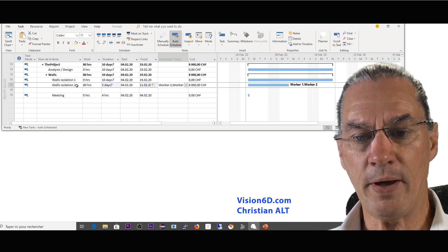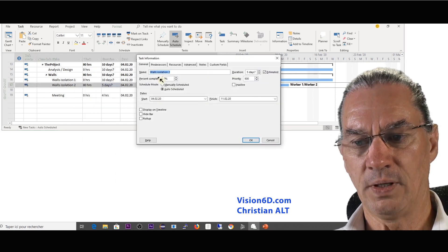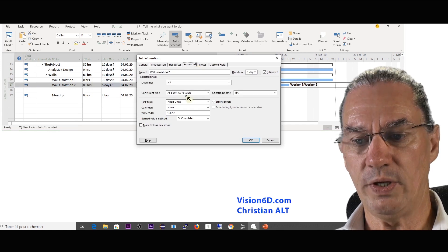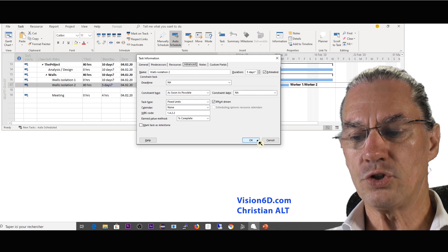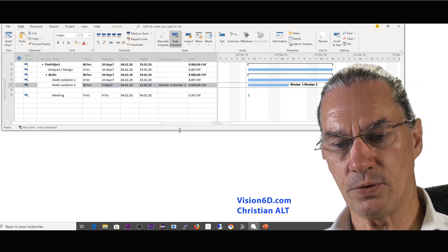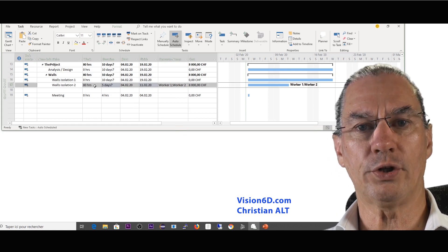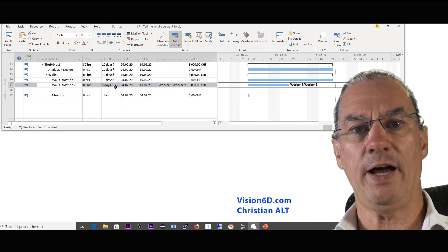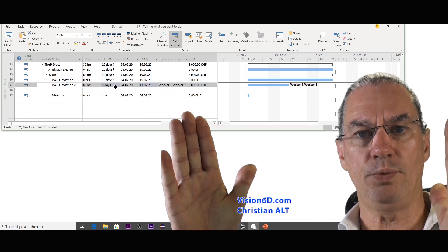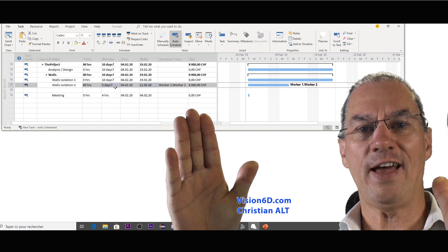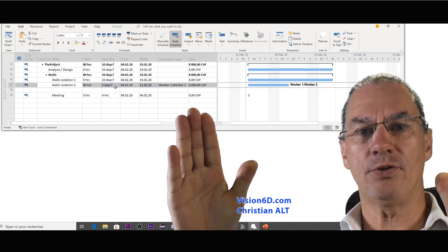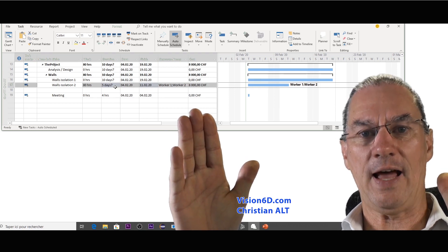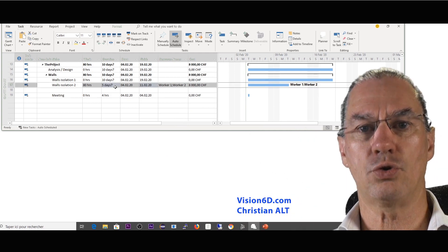To remember, this task here when we go into advanced we see that it is effort driven, which means that every time that we add a resource it's not the amount of work that is reduced but it's the duration. If I have a certain task for two people and I add a second person it will shorten it in two.